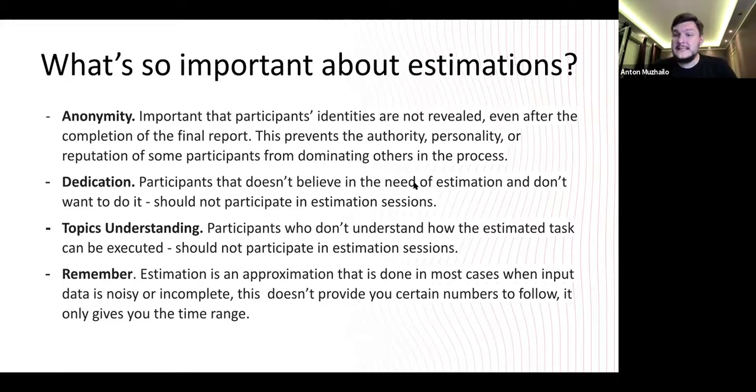Because if you estimate tasks in hours, you will definitely run into this problem. Junior won't be able to complete this task within these hours, right? So complexity removes this connection between the seniority level and the time to complete the task. It just moves to the case where you have an average. And using average, you can always go different ways. Okay, hope I answered your questions, right?